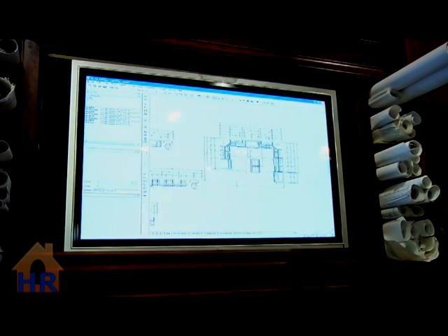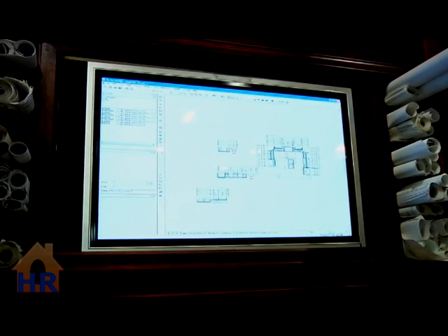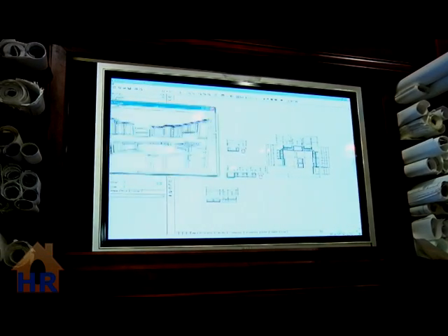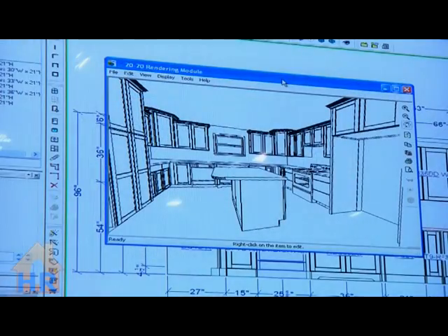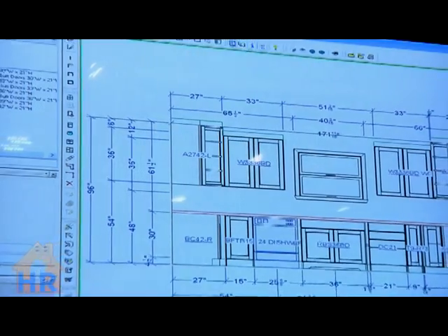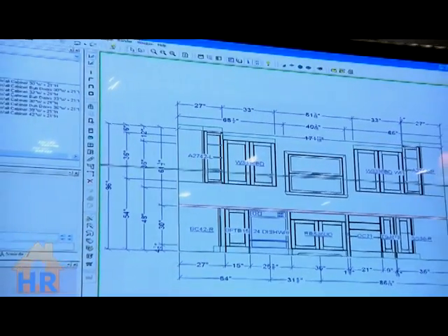How do they get the interior cost? Well, after I meet with them, I can set them up with our flooring department, and he will go through their flooring and find out what type of flooring they want to use. We can also set them up with the cabinet department if they want to use prefab cabinets, and also our appliance department. So once you get all those prices together, then you can give them a one lump sum cost estimate. That's correct. And most people need this before they actually start bidding the job, because they've got to determine how much sheetrock to determine the cost to hang it, to float it, the trim, how much cabinet they have to install, and so forth.